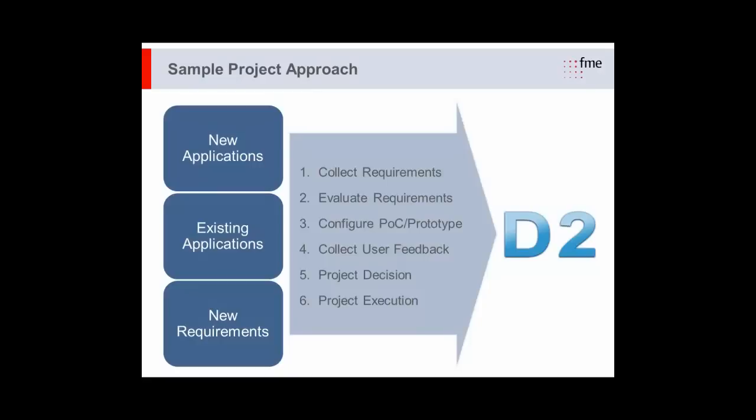But no matter whether the projects go with a completely new application or replacing an existing application or just adding additional new requirements, the project steps within a D2 project might always look very similar. So in the beginning, the requirements should be collected and analyzed in detail again, even when coming from an existing application. And they should be prioritized and evaluated also regarding the feasibility with D2. Because looking at D2, it's a configuration client that might not offer the exactly same possibilities that you had in your old environment.